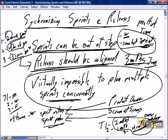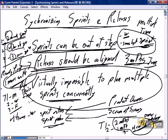So let's say team number one with their short sprints are ready first, but team number two and team number three need one more week to finish their sprint. That's fine. Find some valuable work for team number one to do. Some of this release preparation work, the documentation, the training, the implementation procedures, the cleanup, et cetera, et cetera. So there's always something that we could do to effectively fill that extra week of time to absolutely synchronize our out of step sprints to be fully aligned with the releases. And as they say, I think we need to do that for overall sanity for the business, to keep them from being overwhelmed. But I think there's lots of good reasons why we want our sprints to be at a step so that we can manage the workload of the sprint retrospectives and the sprint plans.